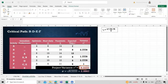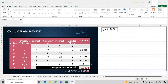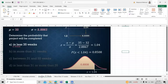The total project variance is 8.33. The standard deviation sigma is the square root of sigma squared, which gives us 2.8867. We need these values to calculate the probability of completing the project within a certain time.